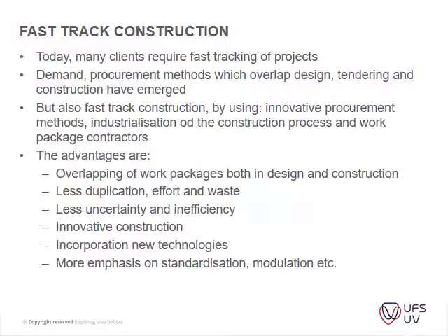So fast-track construction. Today many clients require fast-track construction because whenever the money is approved, they want to try and make use of their money as quickly as possible, because otherwise they have to pay the bond costs, etc. Or if it's public enterprises, then that money should be spent within a certain financial year or so. That's why fast tracking is sometimes so important.